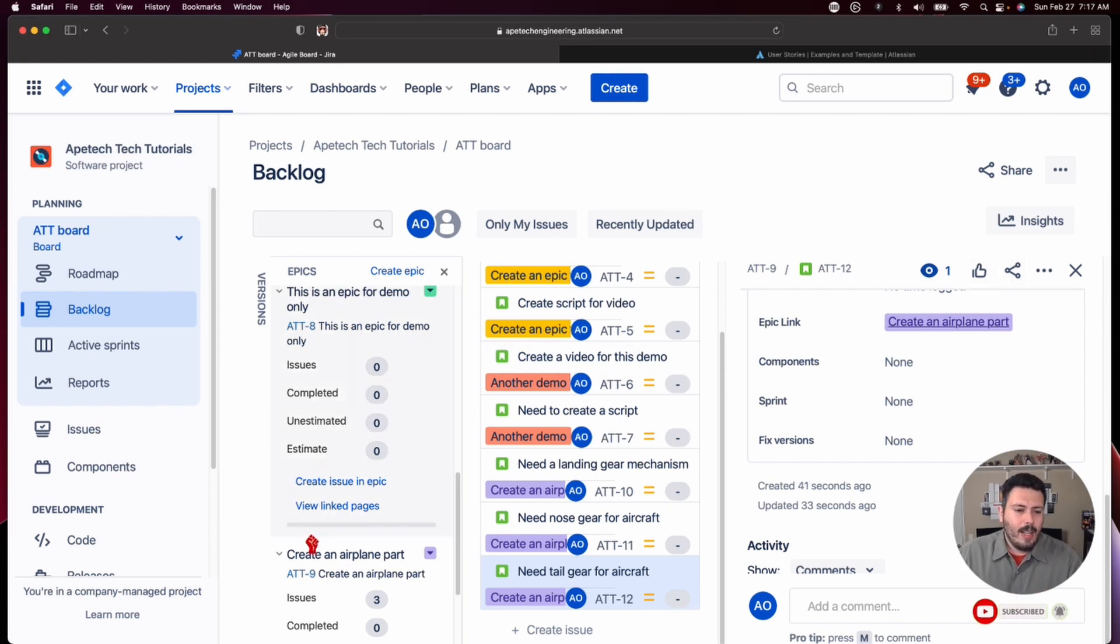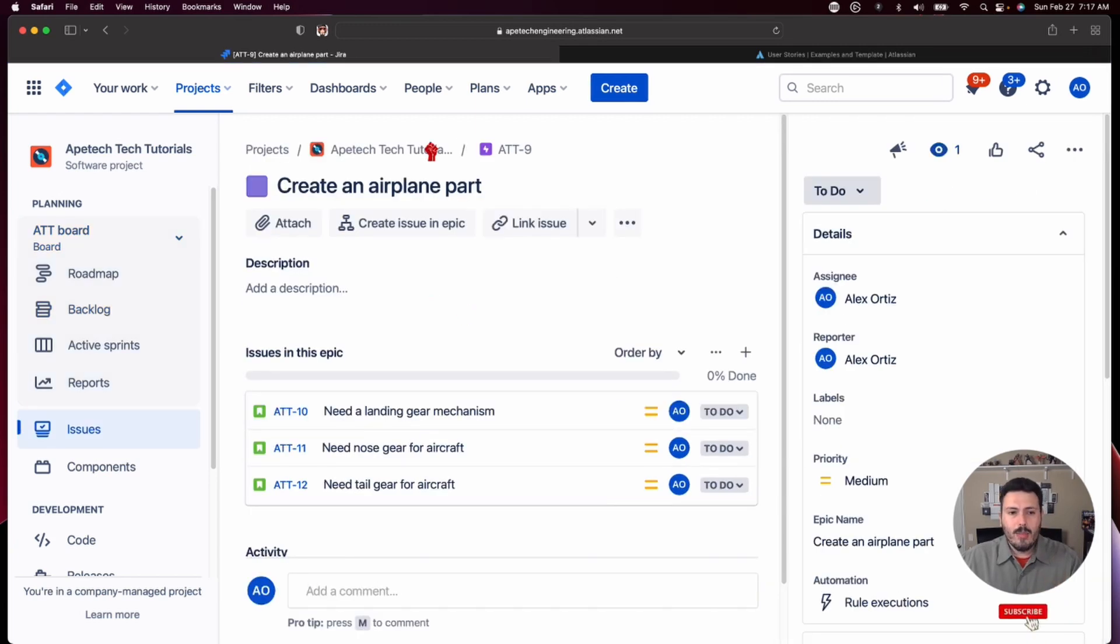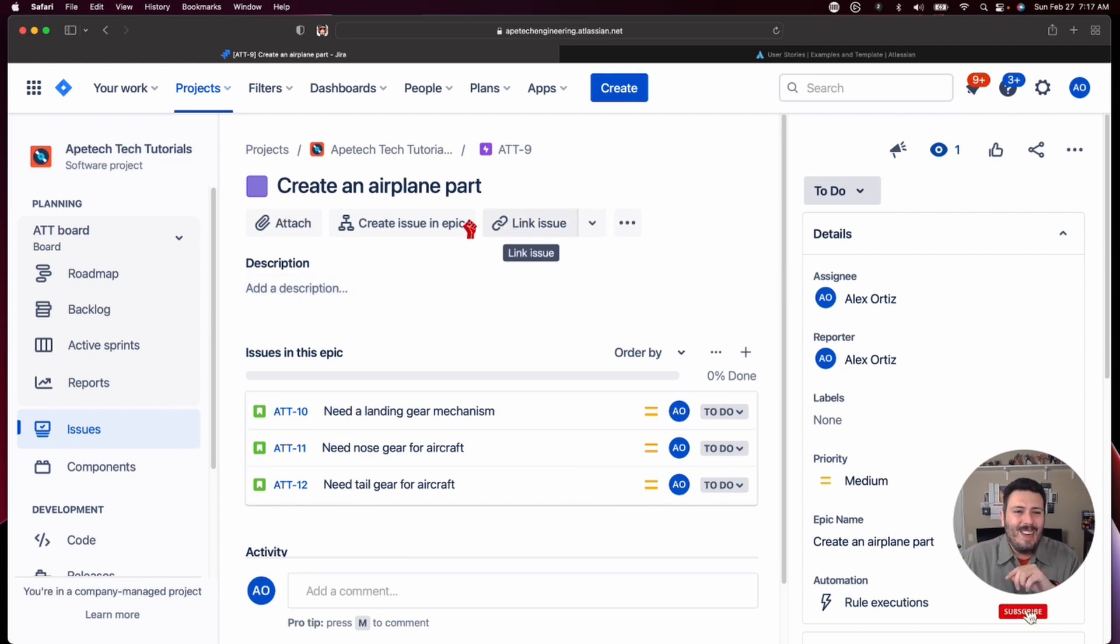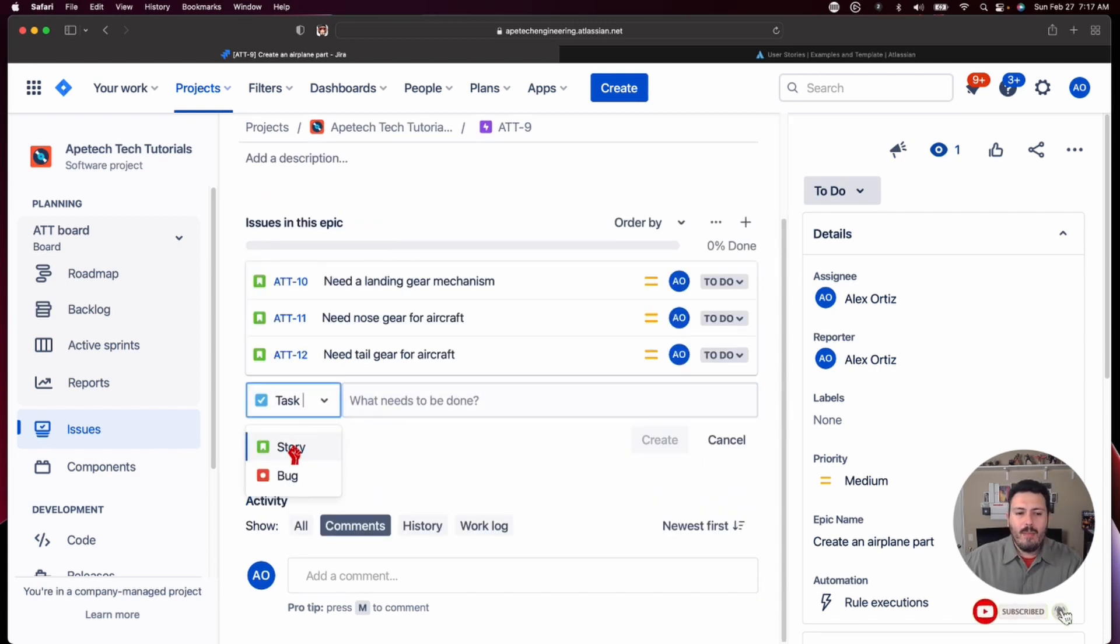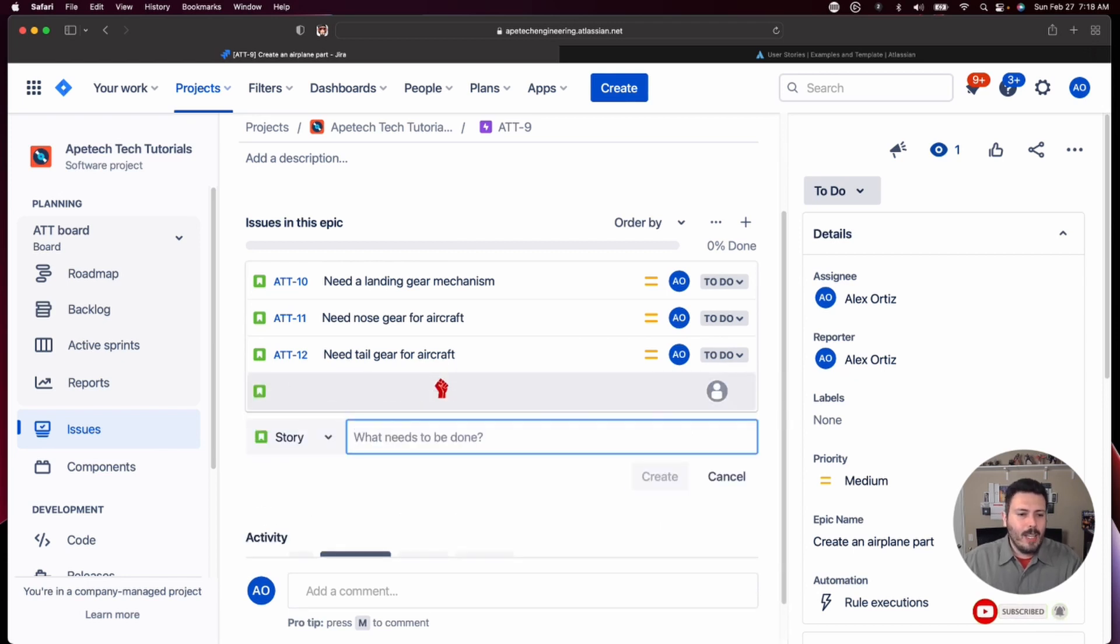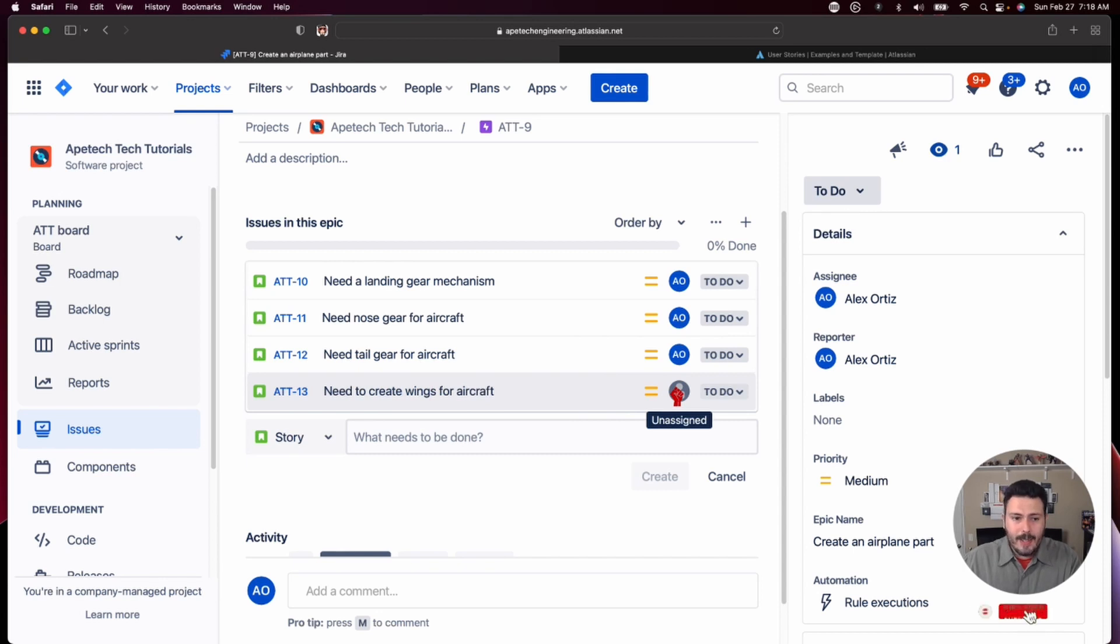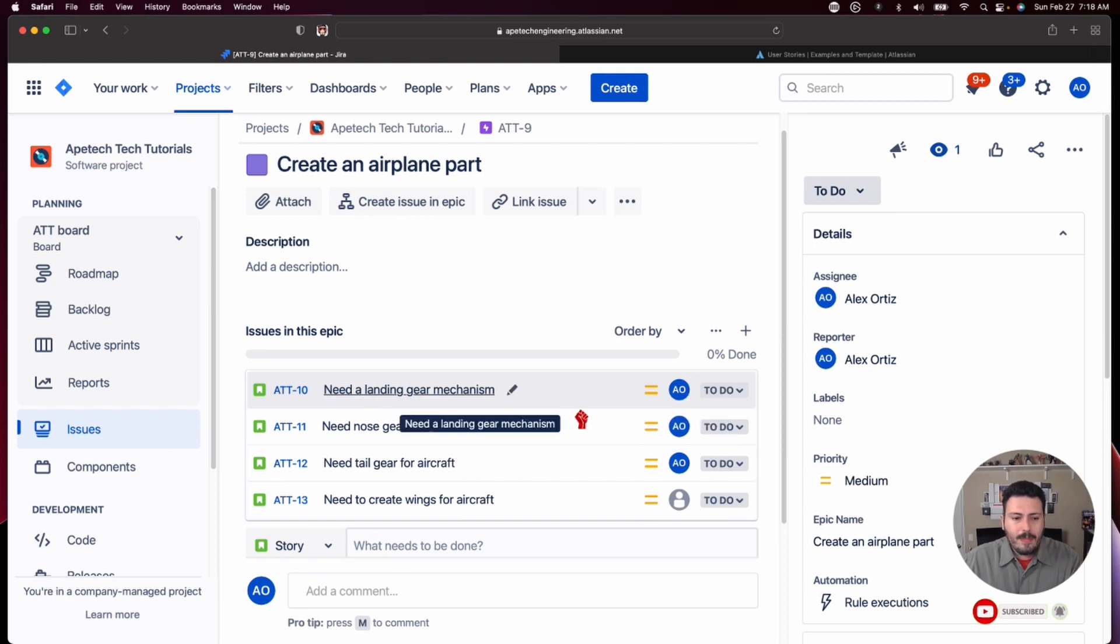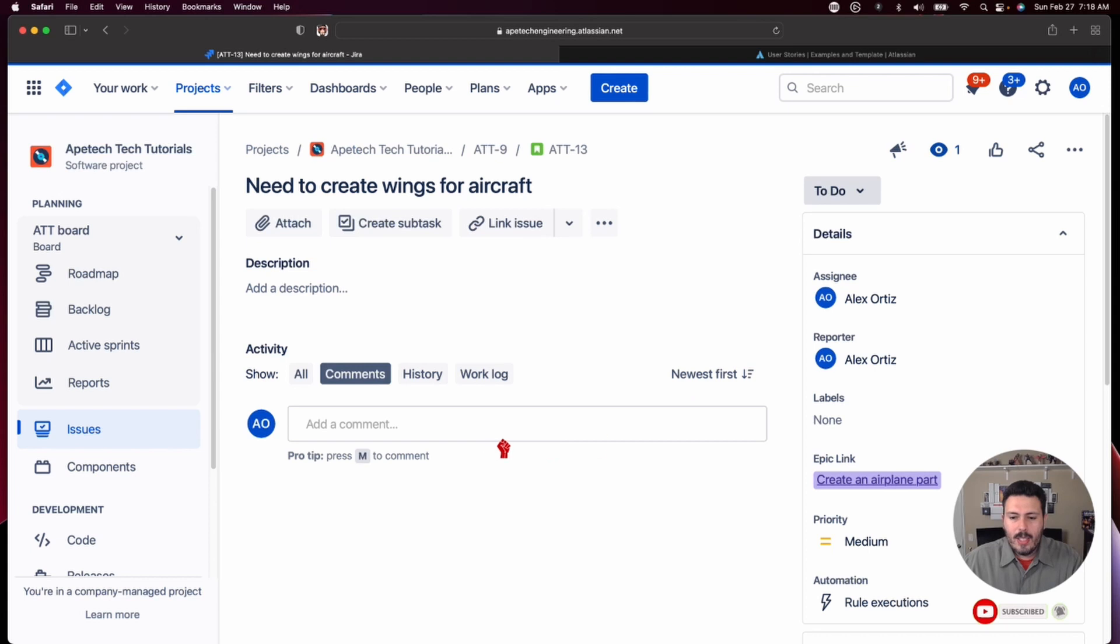And there is a fourth way and then technically a fifth way, but we won't talk about that one. But the fourth way of doing it is if you go into the epic. So I just opened up the actual epic itself. You can just click on this create issues and epic button and this will create. And for some reason, this defaults to a task, which is be mindful of what that is. But now I can say I need to create wings for aircraft running out of airplane parts. And so you'll notice that this now gets created. A couple of things to note is the assignee is unassigned here in this method. You'll notice that the other methods inherited the assignee, but this one didn't. And that's pretty much it. So that's really the only difference you'll notice that the epic link is created there.